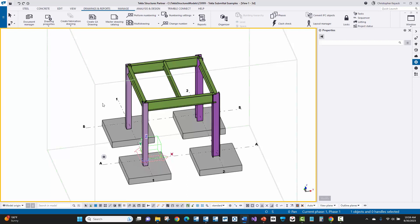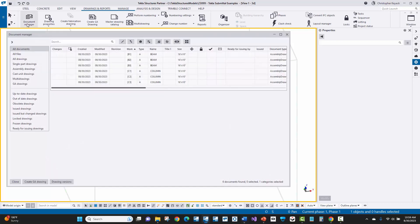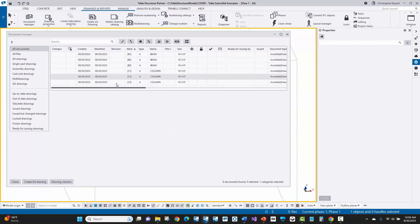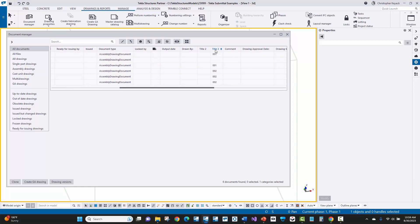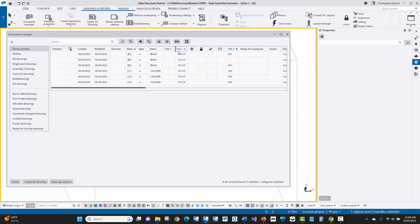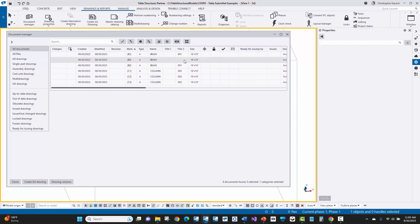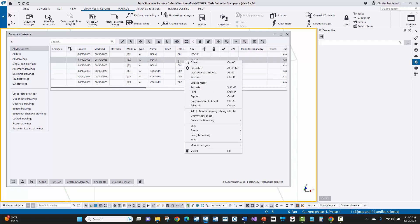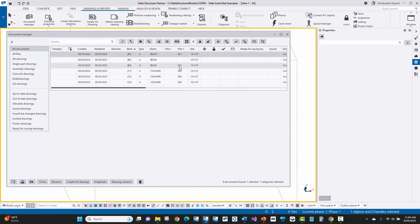The last technique I want to show you is especially useful when the fabricator needs to create CNC exports for specific items included in a submittal and needs to select those items in the model based on that submittal package. In the Document Manager on the Drawings and Reports tab, I use the Title 3 field here. I tend to use Title 3 rather than Title 1 or Title 2, because those are often used by the detailer for other things. You can see I've got 'Submittal 1' and 'Submittal 2' in different drawings in the Title 3 field.